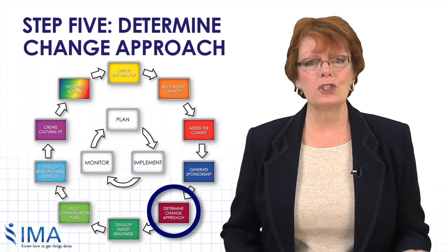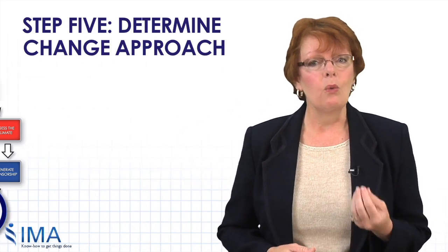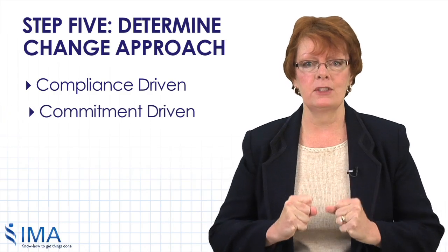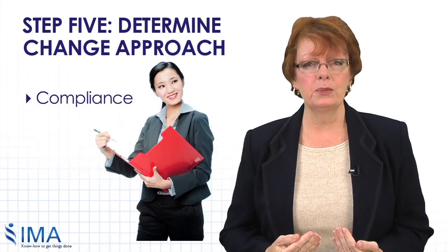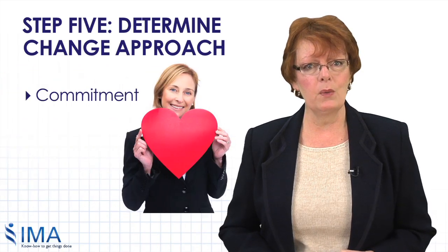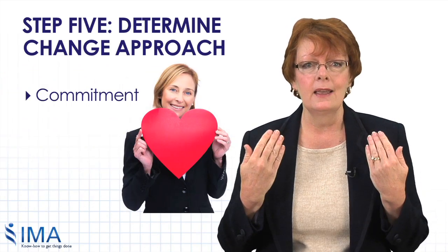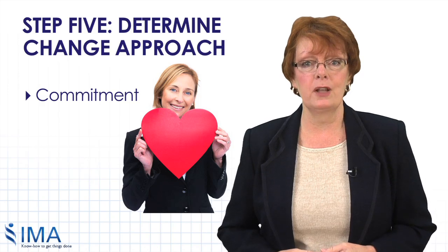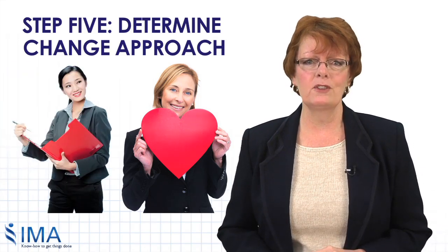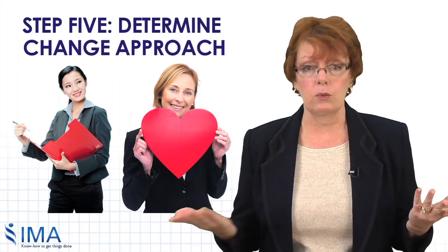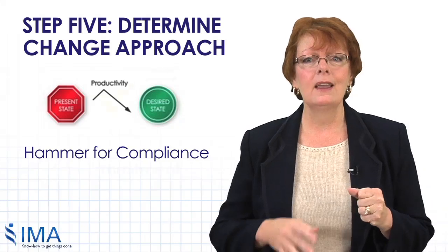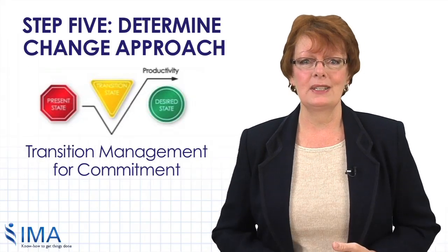Determine Change Approach, the next step, identifies which components of the change are compliance-driven and which are commitment-driven. How we implement compliance, like regulatory-driven changes, is different from changes where we need to win the hearts and minds, the commitment of our reinforcing sponsors and targets. The project you're working on may have elements of both. It's not a question of what's right or wrong, but the approach is different. Hammer for compliance, transition management for commitment.